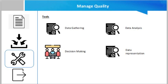Now talking about the tools for this process: the first tool is data gathering, which includes quality checklists. These verify that a set of required steps have been performed or check if a list of requirements has been satisfied. These checklists are usually based on the acceptance criteria included in the scope baseline. Then there is data analysis.